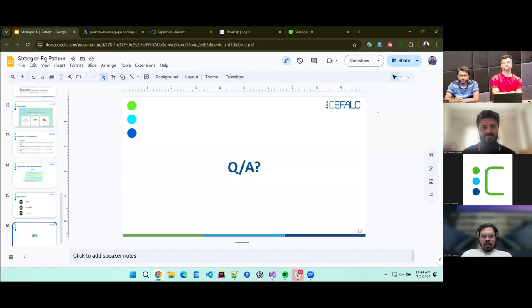So the pattern is, suppose Jahid is working on the login part. He is doing the username, password, login part. When he completes the development, before creating the PR, he assigns the task to some other member. The other team member spends 1 or 2 hours fully testing the feature. When that full testing is completed, then Jahid can create the PR. After that, I start testing the application, because there is no other option available. We cannot write unit tests for his existing application and don't know which area is written where.